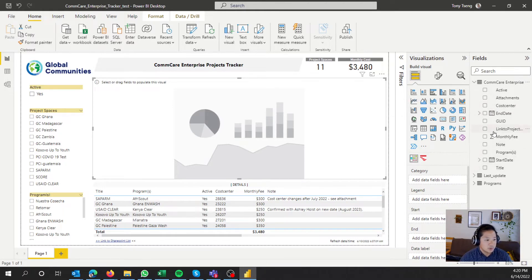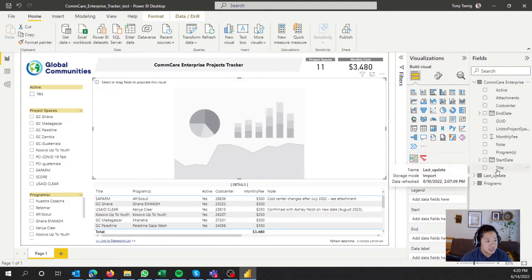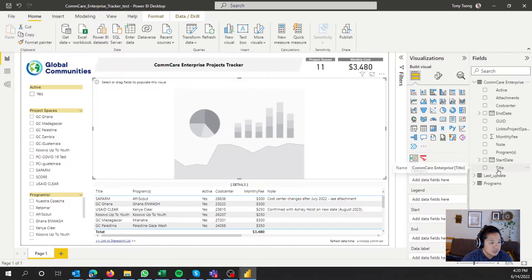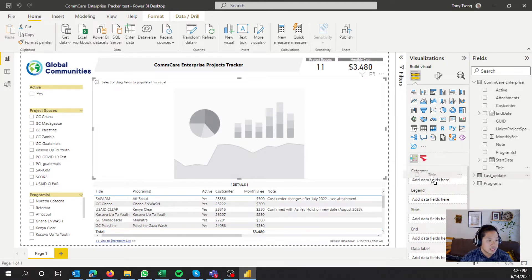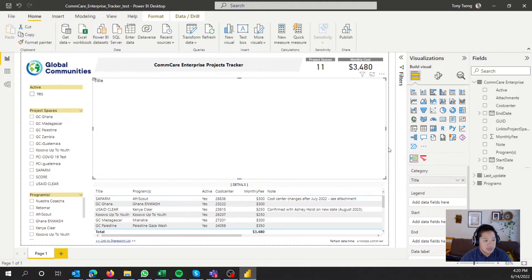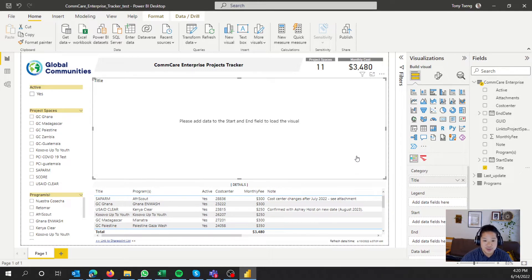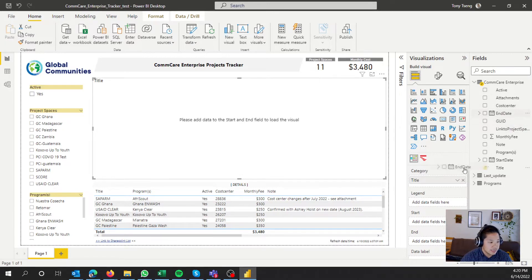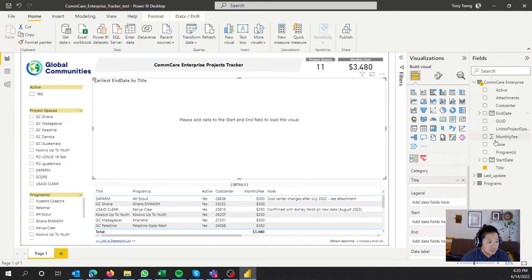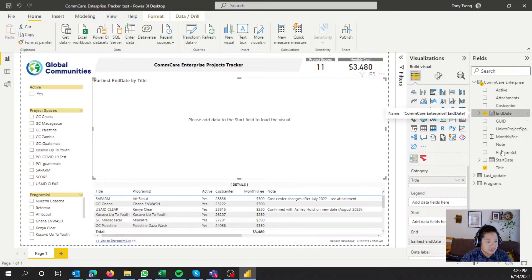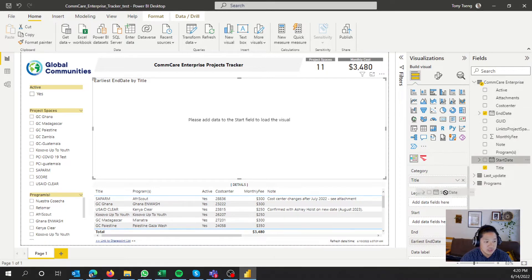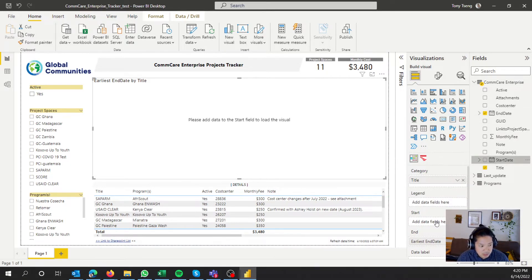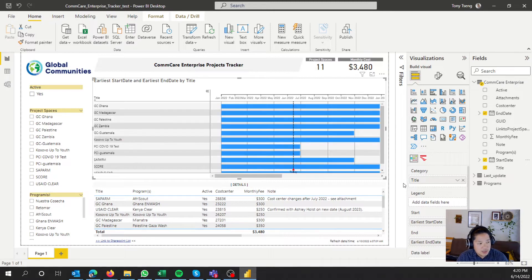And then we're going to have to populate the Gantt. So category, because I know we're tracking a Comcare Enterprise, and this data is driven from a SharePoint list. We'll use the title as the categories. We'll drop them in, and it's not going to show anything because you need to populate the rest of the Gantt, because Gantts need start and end dates, otherwise it's not going to work. So end date, we'll just drop it into end date, and you'll notice that it's a calendar value. So we'll go ahead and do the same for start date. And then you should see this.